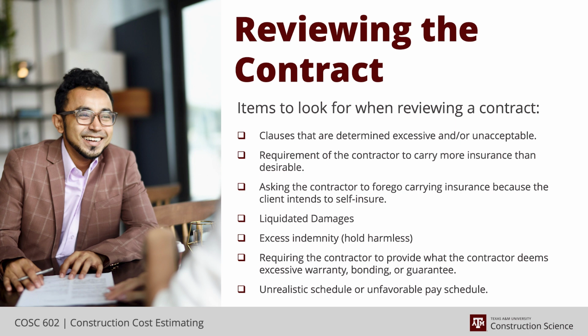Do you think, it's unlikely we're going to run past the MC date or the commissioning date or the startup date by more than 2 weeks, but we think we might overrun by a week or 10 days or something. So what's the probability? So you might put some money in to mitigate that.